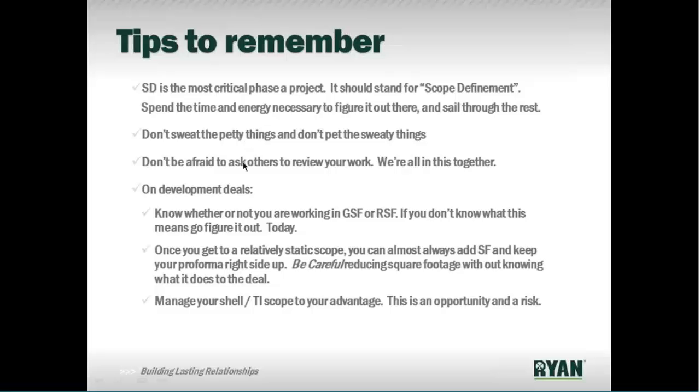Don't be afraid to ask others to review your work. We're all in this together. On development deals, know whether you're working in gross square foot or rentable square foot. If you don't know what this means, go figure it out today. Once you get to a relatively static scope, you can almost always add square foot and keep the pro forma right side up. Be careful reducing square footage without knowing what it does to the deal. Manage your shell and TI scope to your advantage. This is an opportunity and a risk.